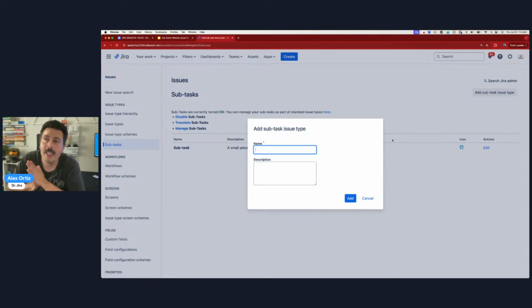Now, in case you're wondering, can I have a level -2, -3? As of right now, no. I know that a lot of people usually ask, can I get a subtask to have a subtask? Not possible today. So what I usually tell people is you've got to shift to the left, because you can't create more negative levels, but you can go above 1, 2, 3, 4, 5. So I usually tell people you just have to shift your logic over by 1, and then you're good. But again, we'll get into that detail in just a minute.